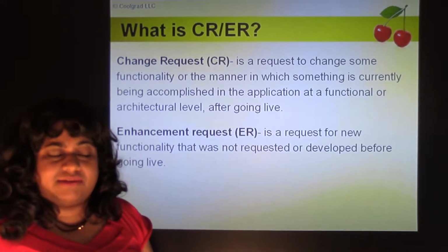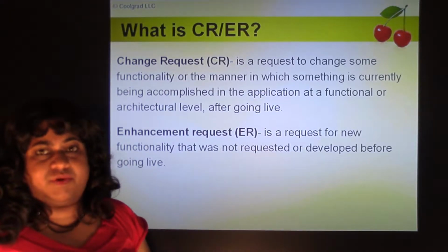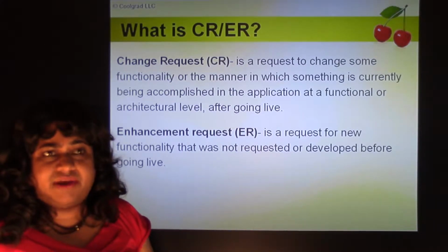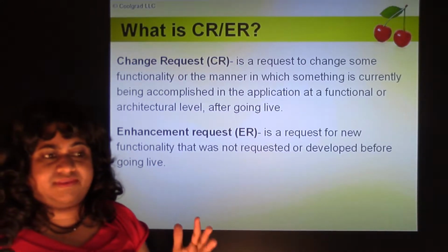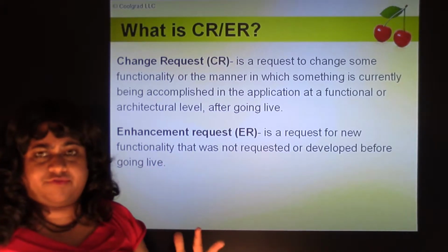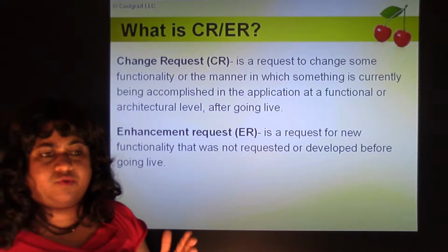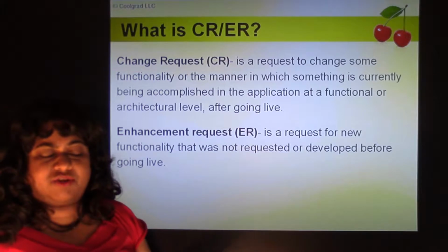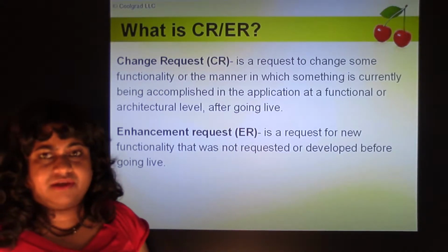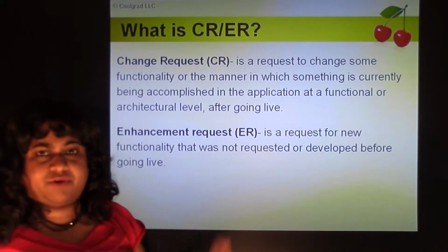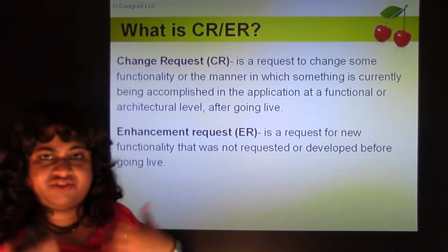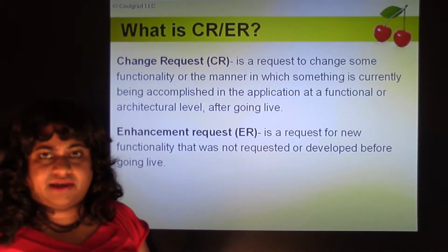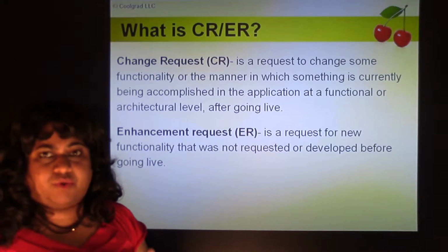So in any software project, suppose you're working for a customer, a client, they give you the business requirements in a BRD, business requirements document, or set of business process flows, or a whole lot of documentation telling you what exactly they expect from this project. So there is a standard scope of work, and then the implementation partner or the system integrator who is implementing the project, they usually prepare the statement of work based on their understanding of the requirements, and once they review it with the customer and then it's signed, it's frozen, so you can't change the scope of work after that.